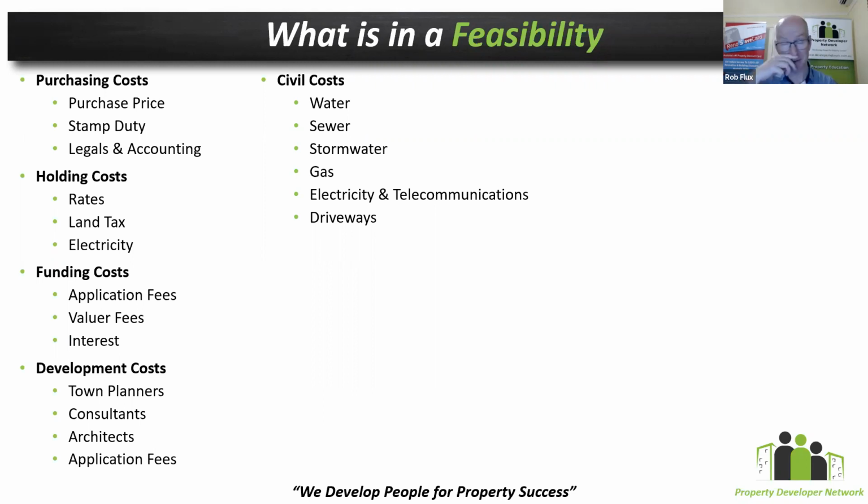Now, those costs are very subjective to the site itself, understanding things like the contours, which way the property is sloping, where the services are. Are they in your property? Are they in the road network? Are they in a neighbour's property? Those sorts of things can greatly impact those costs.